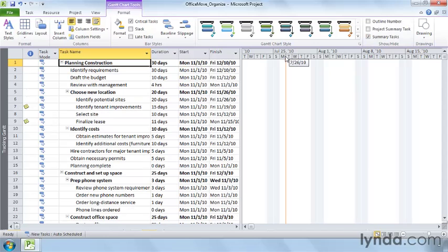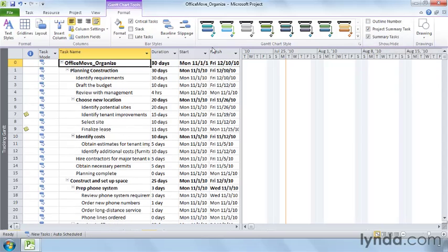The Project Summary Task is a good tool for checking project-wide values like the full project duration, the project finish date, and the total project cost. To see this task, just turn on the Project Summary Task checkbox. The Project Summary Task is like an ultra top-level summary task, and it has a special task ID of 0. On the other hand, the WBS code is a field you have to insert into a table.